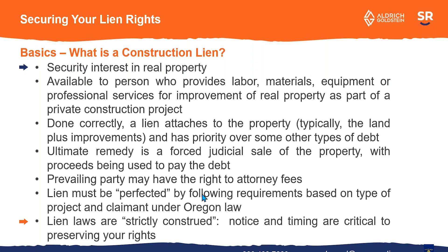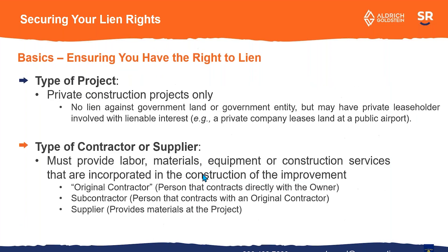Rarely does it come to that. Sometimes you can file a lien and get paid right away. Sometimes as a subcontractor you file a lien and the general contractor provides a bond, basically attaching that lien to the bond itself. But it is potentially very serious that you could be taking somebody's property to satisfy a debt, and that's why the lien laws are strictly construed. Things like notice to all the affected parties and timing are critical to preserving lien rights. You can only file a lien on a private construction project — you can't lien government land or a government entity. That's why there are bond claims, which we'll talk about in a bit.